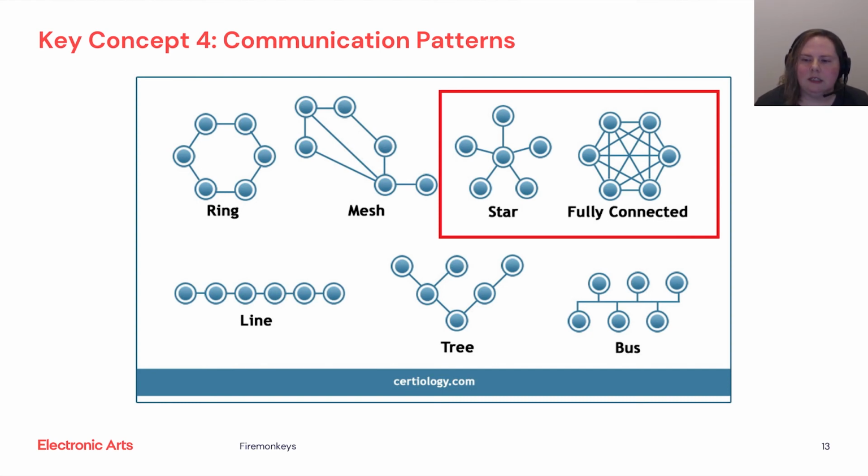Generally, some great places to align communication are at the end of delivery phases. An alert to stakeholders to let them know that you're leaving pre-pro and are moving into prod, or that you've completed prod and are now in first pass testing. In fact, you can align around any milestone, and milestones are great places for key controls as well. As control points are great, you can change a push system to a pull system by pre-scheduling alignment points to form gaps into the schedule.